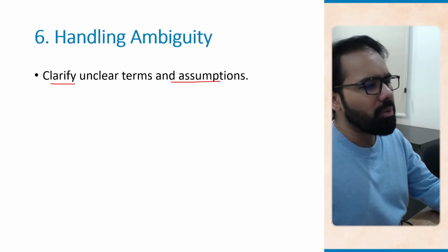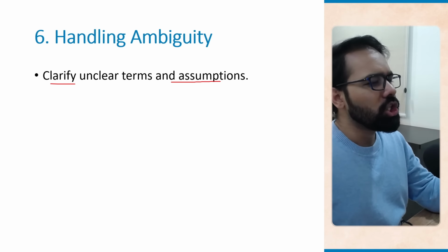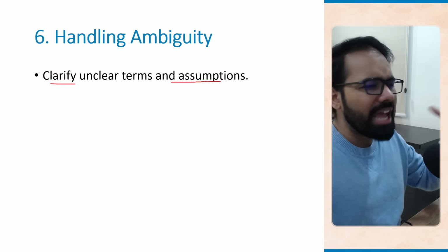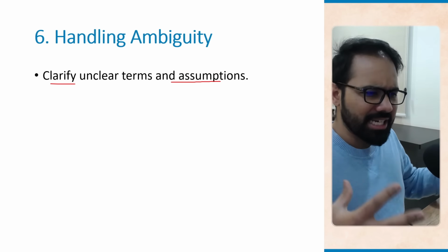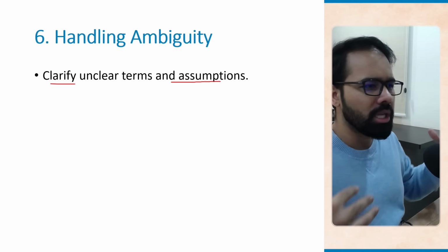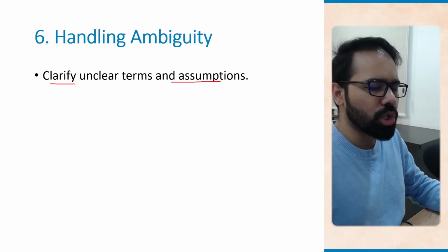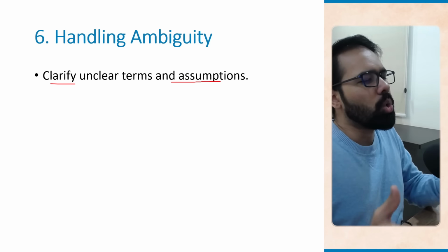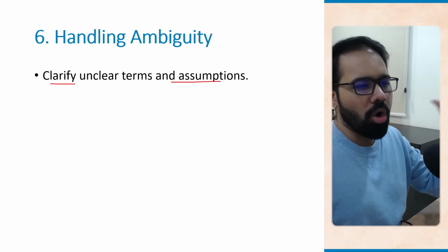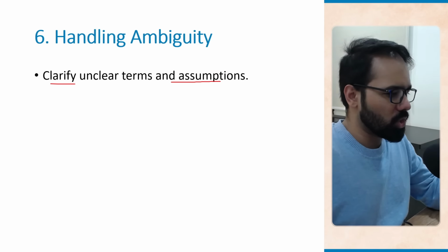In fact, in our e-commerce website project, you should ensure everyone agrees on what go live ready means. Does it include that SEO testing should also be done? Does it include mobile optimization should also be done? Or does go live ready simply mean that the website is ready to be run on desktop and PCs only?